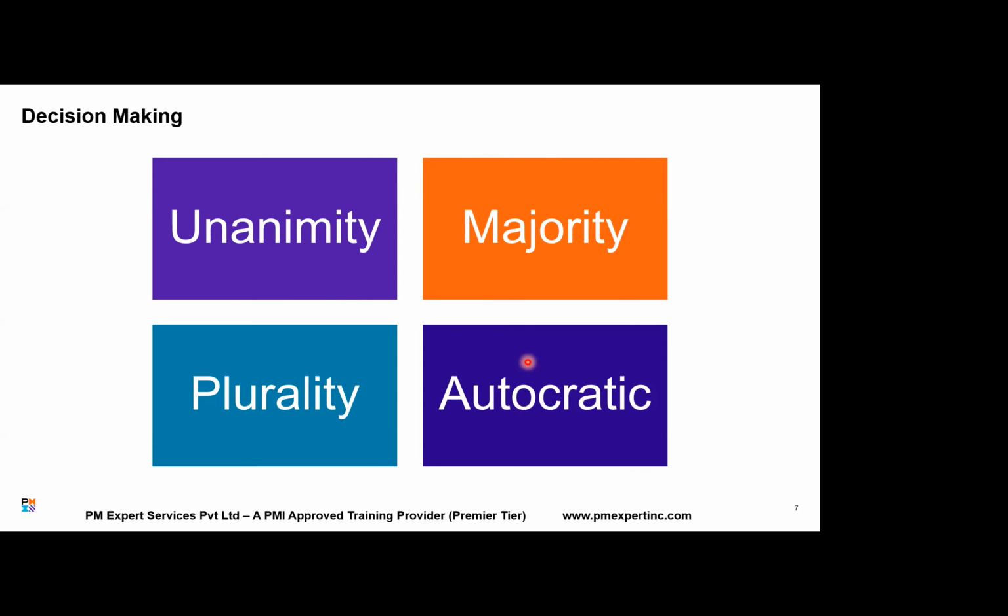And you go with a decision when the average is 3 or more, right? And definitely you'll talk to people who have raised less than 3 fingers, 1 or 2 fingers. And if you don't show any finger, then this means that you are totally against that decision.